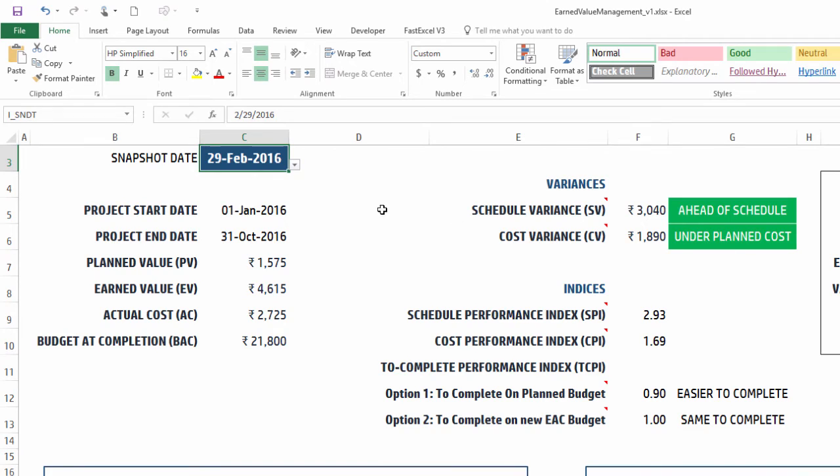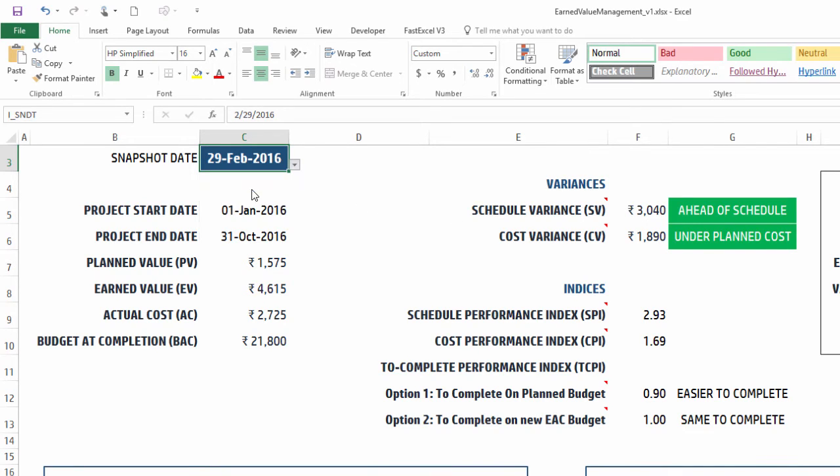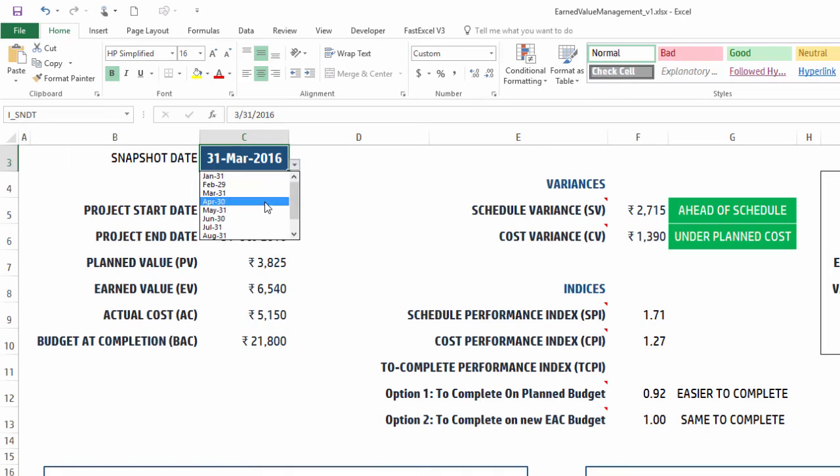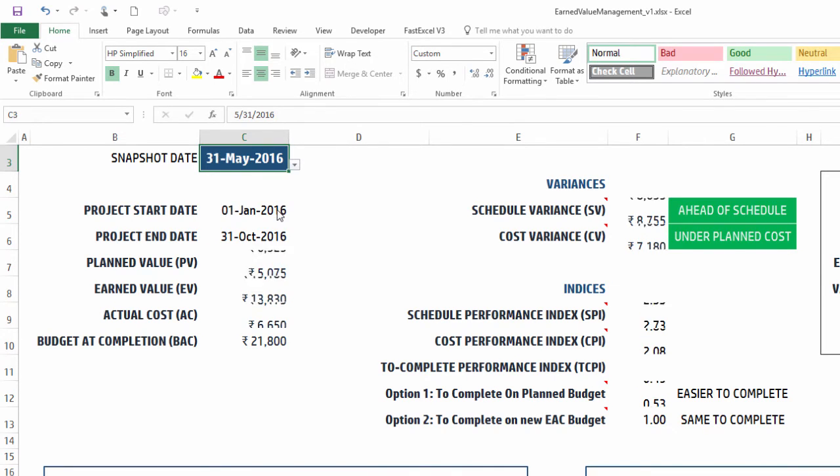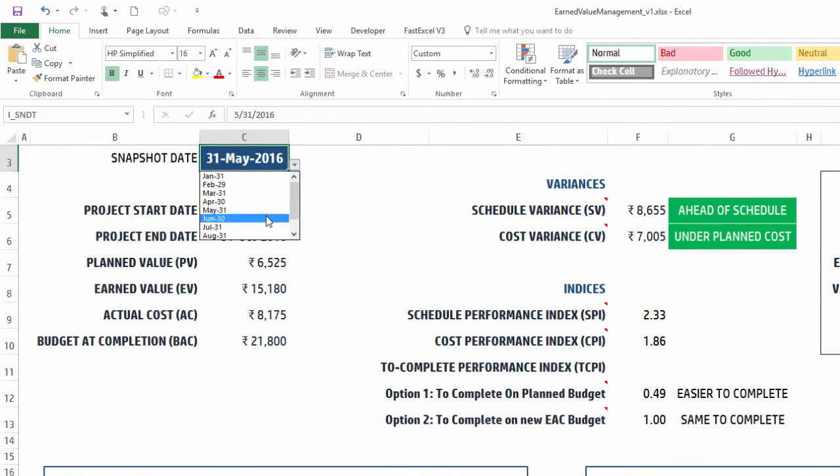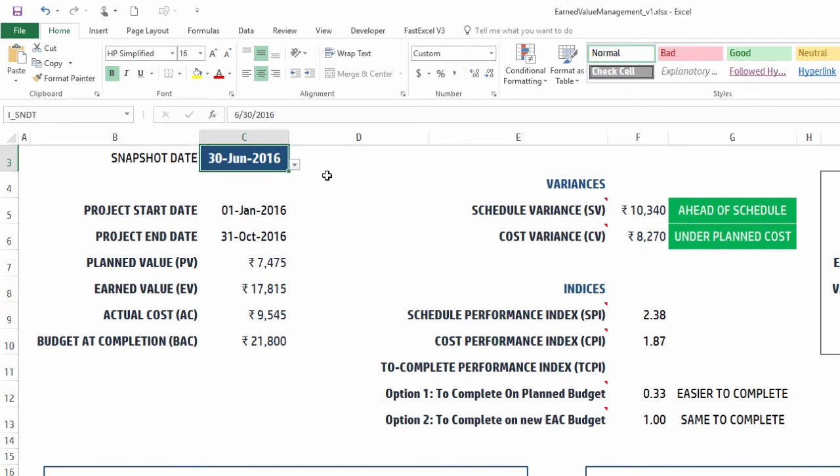February, we were ahead of schedule, we were under the planned cost. Then we go to March and we're still doing okay, then April - so you can easily track these by each month that we have gone through, and all these calculations will update.